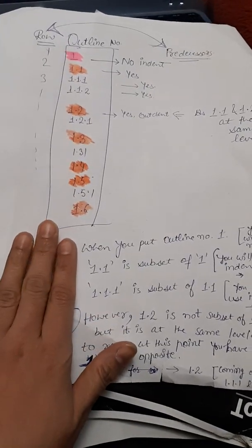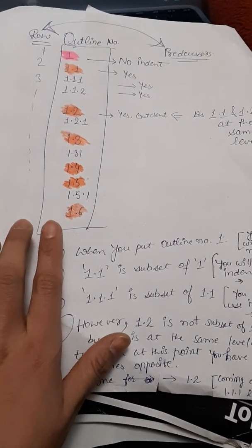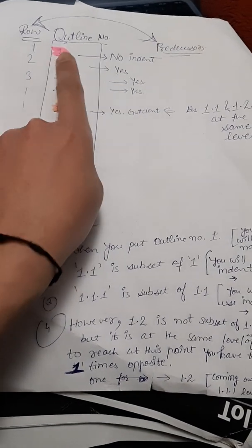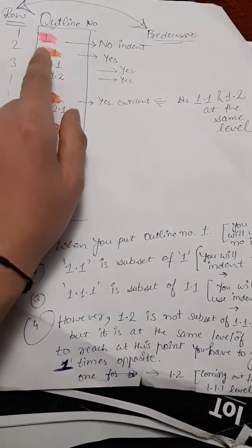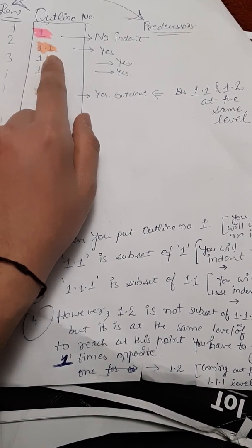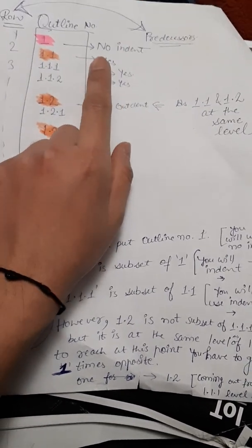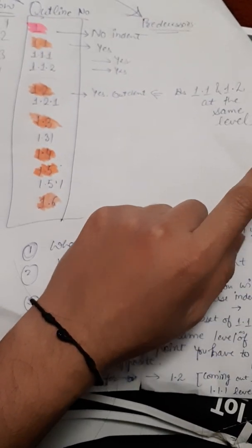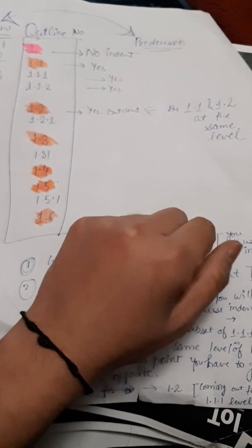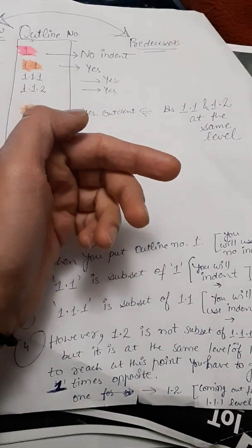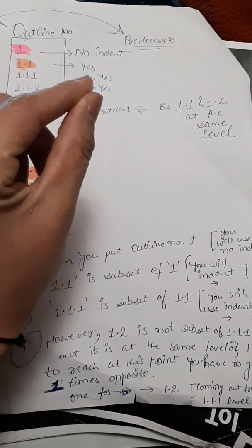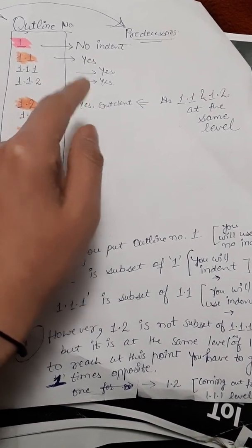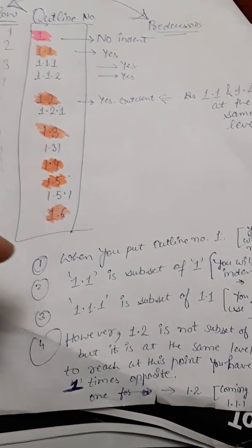So you can see outline numbers, right? Just to show you indent, outdent, let's just use it. When you put this, you will not put any day, but when you start from 1.1 you need to follow the exercise. You will put duration, predecessors and resource name, not the start and finish date, because when you start the project you need to use Project Information as I told in the previous video. So that's why it will auto schedule. The option will help to pick the days automatically. Be careful. So let's see.